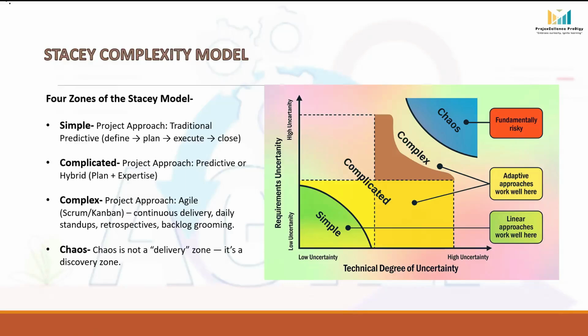So the best approach to handle this kind of project is hybrid. Start with a predictive plan, but stay open to expert adjustments and technical reviews as you move forward.